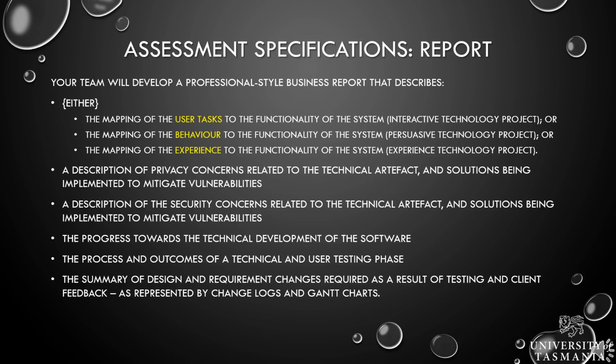That's fine when we learn about how we do projects, but professionally, that is not how we do these things. Professionally, when things need to change, we have what are called change logs. And this is where we're expecting you now, not just to say we've decided something has to change, but to actually go through a formal process of getting approval for those changes from your client.